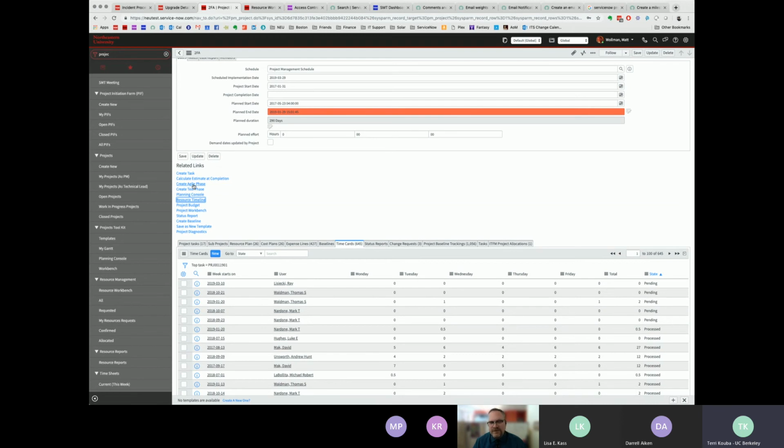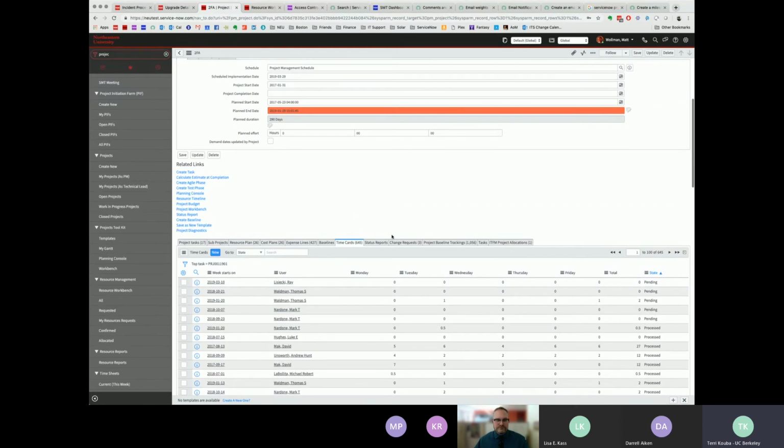Right. And I think in our case, we might end up doing a little bit more like a sprint, so, hey, you're going to be allocated this much to the sprint. And then whatever stories you're working on are in there, and you're handling it in Jira, but you come back and you're charging your time in ServiceNow. So that project task kind of equates to a sprint. I don't know if that's really best practice, but that's sort of our current practice. Okay. Well, the best practice is the one that's followed.